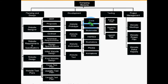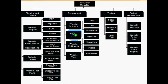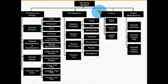Here is an example of a WBS for a company website. Under planning and design, you identify the website designer by preparing a statement of work, making a request for proposal, getting the proposal, and signing the contract. The lowest level in a WBS is called a work package. In this example we have level 0, level 1, level 2, and level 3. When estimating, you always estimate at the lowest level — estimate the work packages and roll them up to get higher-level estimates.